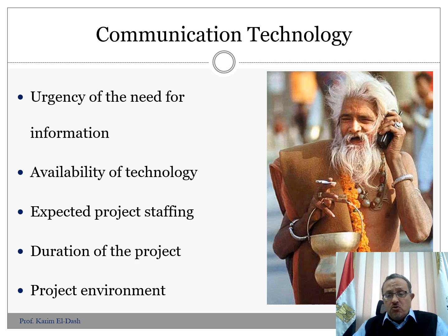If the project is too short, in this case we have to use very fast communication means. We cannot rely on people to deliver messages or envelopes or drawings. In this case, we have to use the new, high-speed technology that we have in order to complete the project as fast as possible. Then the project environment: what are the requirements?